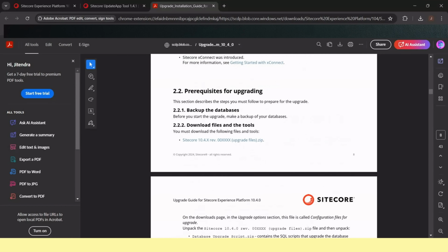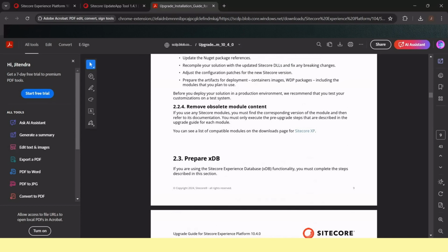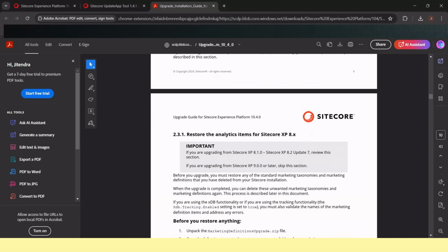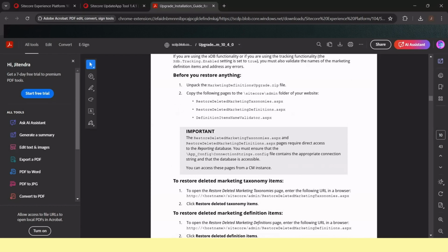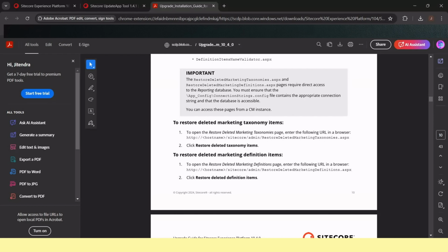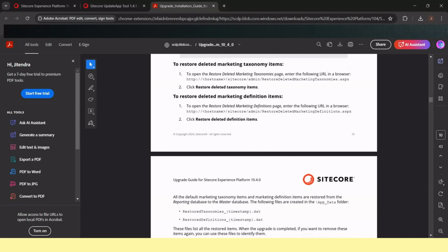You need to check this in detail. And as I said earlier, in pre-upgradation you need to create a runbook from this. Whatever is needed for your application, create that checklist and task list, and follow it. You download this file, understand it, and prepare your own version of what you need to do for your migration. Then follow those steps. This is how you do this approach, where you are updating your existing system.